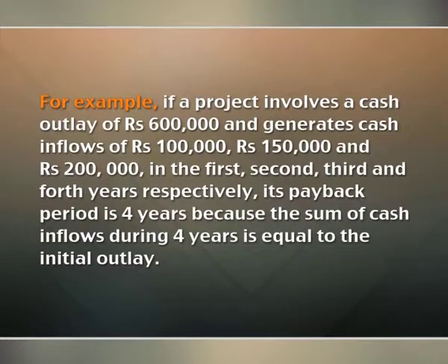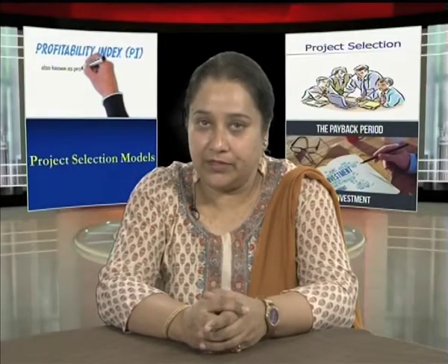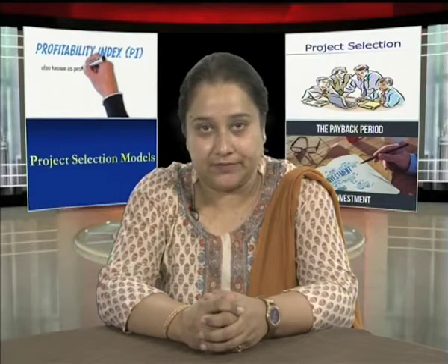investment. For example, if a project involves a cash outlay of rupees 6 lakhs and generates cash inflows of rupees 1 lakh, rupees 1,50,000 and 2 lakh in the first, second, third and fourth years respectively, its payback period is 4 years because the sum of cash inflows during 4 years is equal to the initial outlay. According to the payback criterion, the shorter the payback period, the more desirable the project.